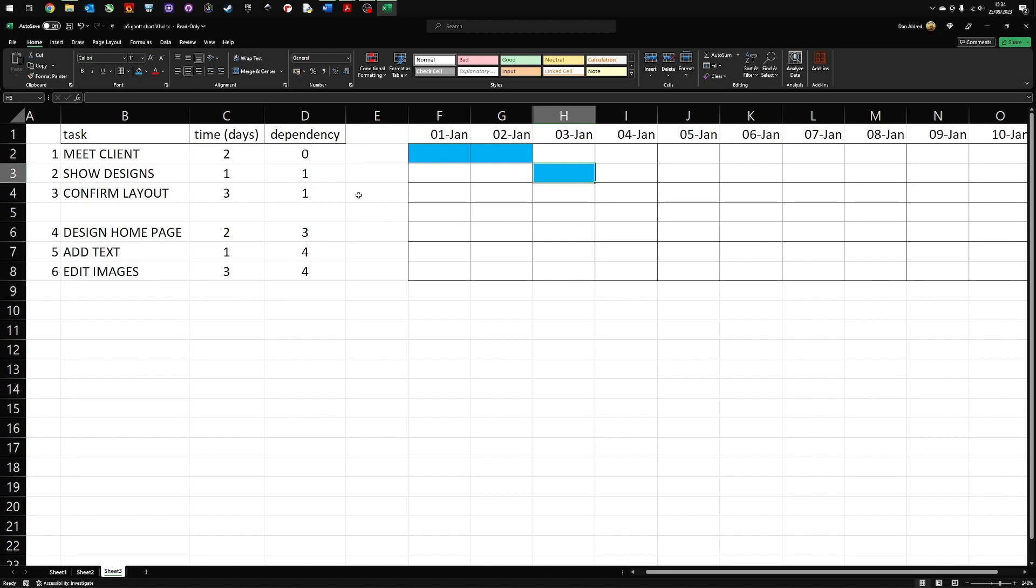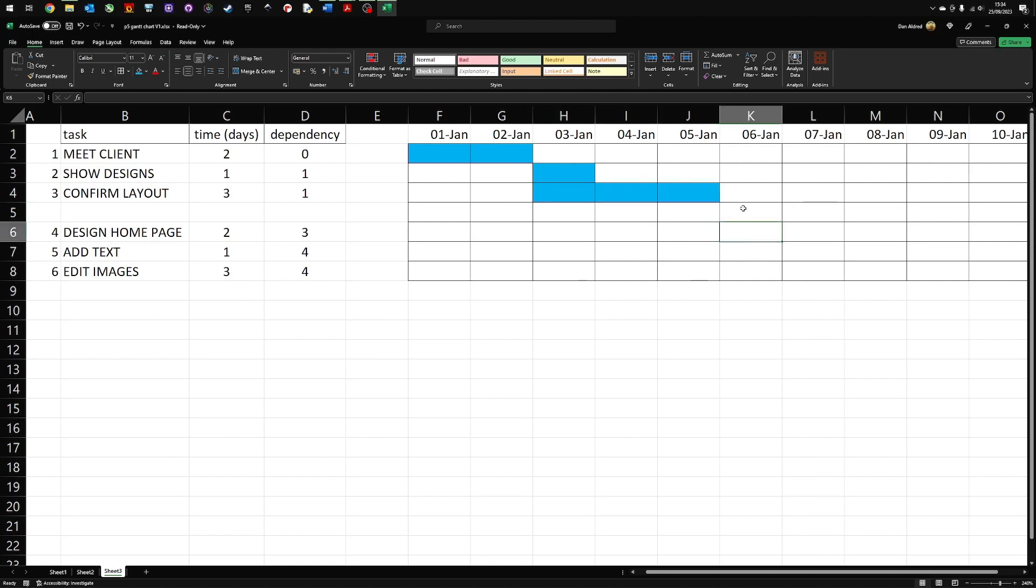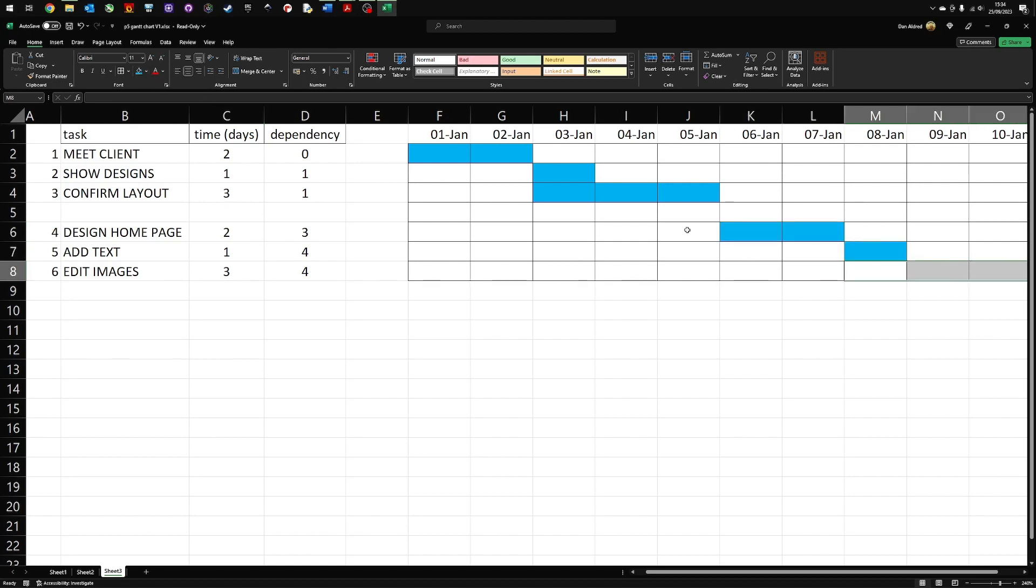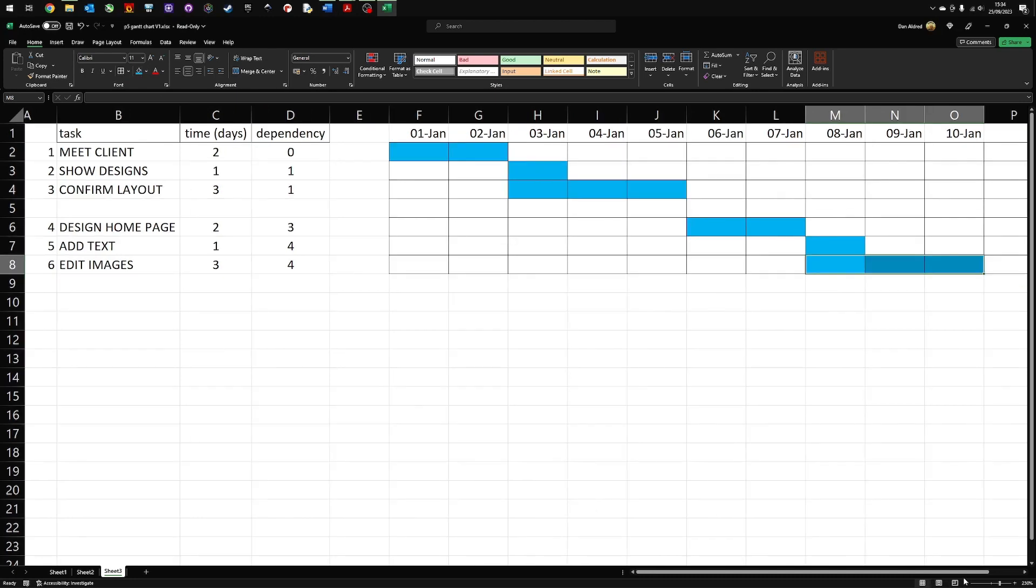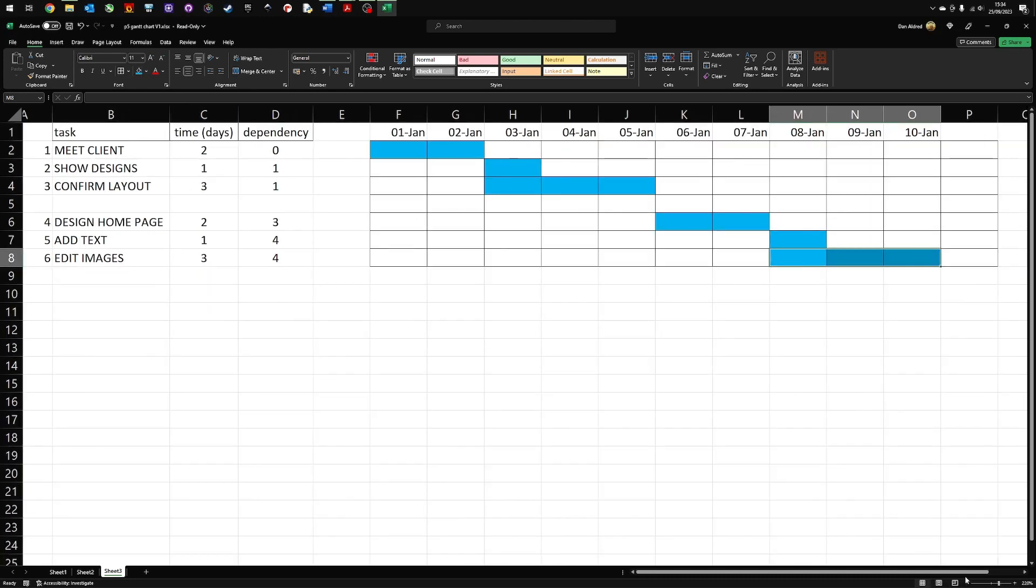I can confirm the layout after I've shown the design. So that could happen at the same time. But that takes three days. Color it in. Next up, we have designing the homepage. I cannot design the homepage until I've confirmed the layout. So I have to do the task here. And it's two days. So I'm going to color that in. You can see that I can add the images. And that's a one day task. And I can edit the images at the same time. That's a three day task. So I'm starting to build up the Gantt chart as a visual overview of what needs to be done when.